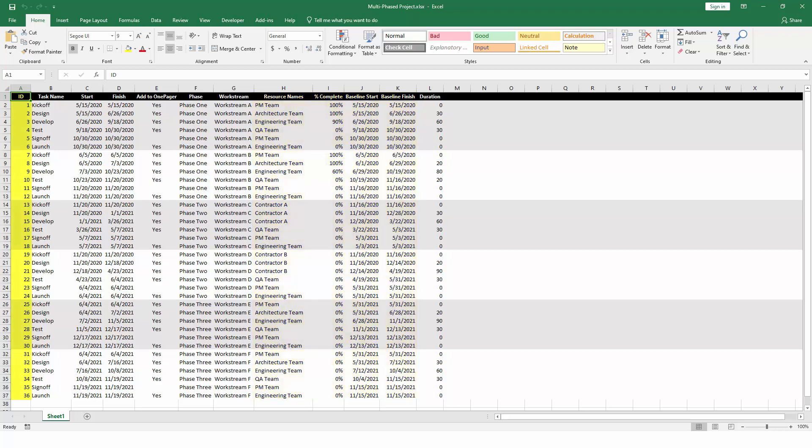We also recommend including a unique ID in your Excel file. Think of a unique ID as a serial number or a fingerprint for each task. Here we've just given each task a number, which will work fine so long as the number doesn't repeat, and as long as the given task always keeps its originally assigned number, even if you add or remove tasks from the spreadsheet later.